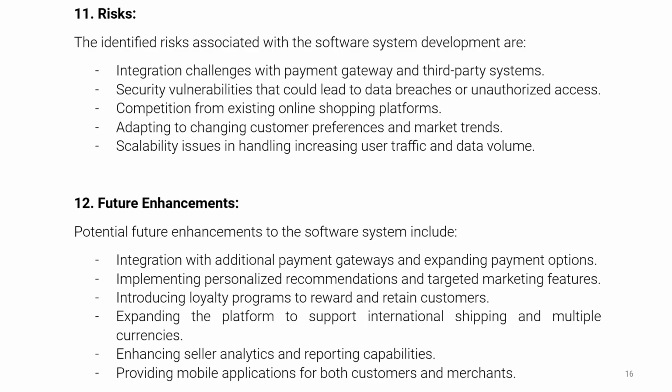Risk. The risk section identifies the potential risks and challenges that may affect the successful execution of the project. It is essential to identify these risks early on to plan the mitigation strategies, or how to avoid those risks or minimize the risks. Okay, for example, here, integration challenges with payment gateway and third-party systems.